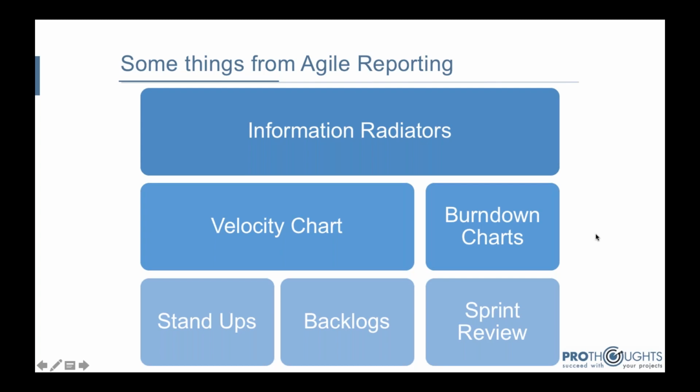And the burn down chart is like your status report. What is the ideal amount of work you will do per day, and what you are actually doing, and you can get variances on a burn up or a burn down chart.